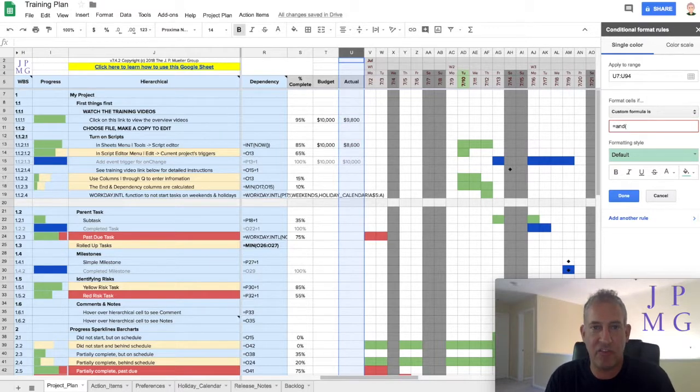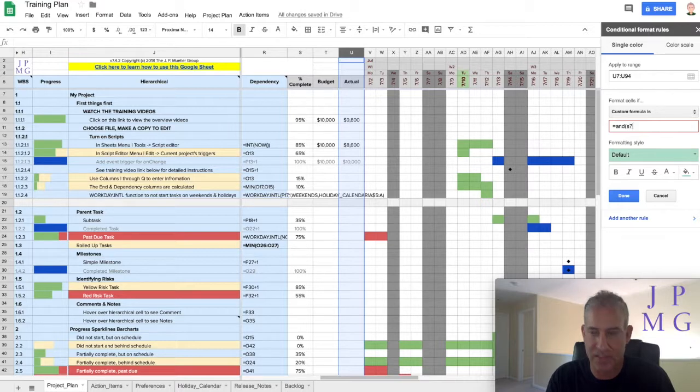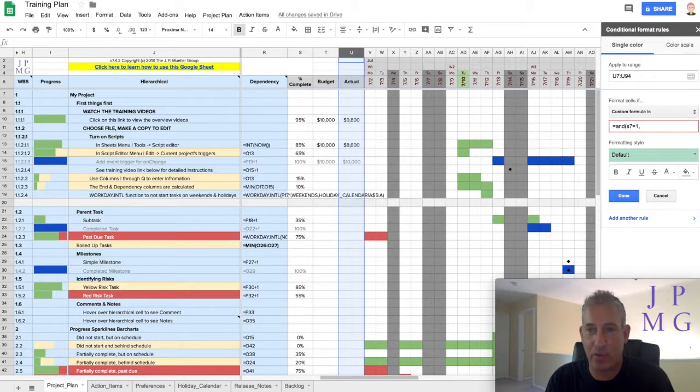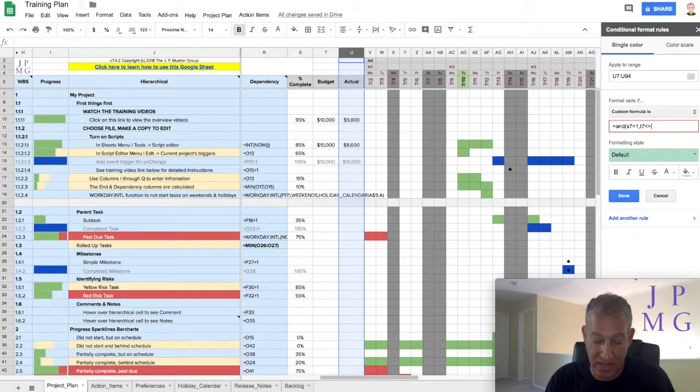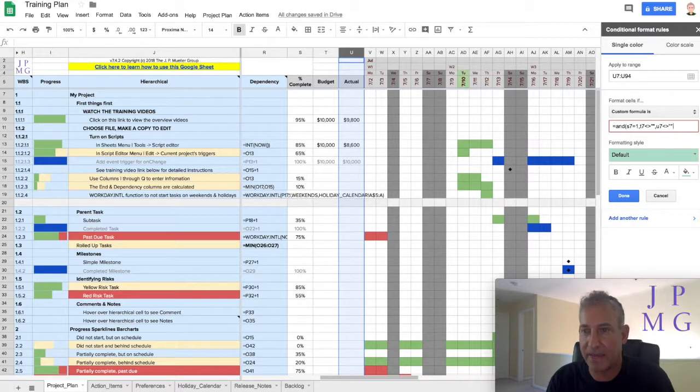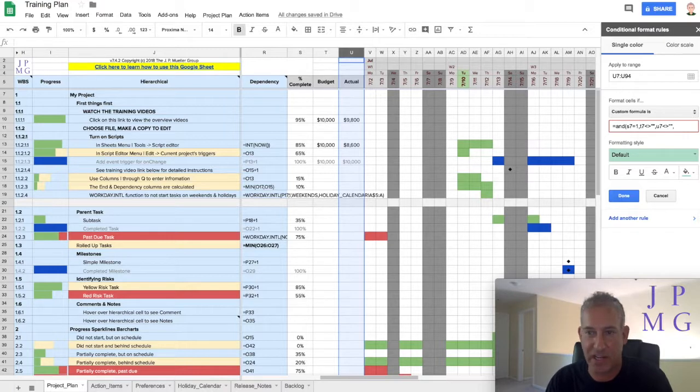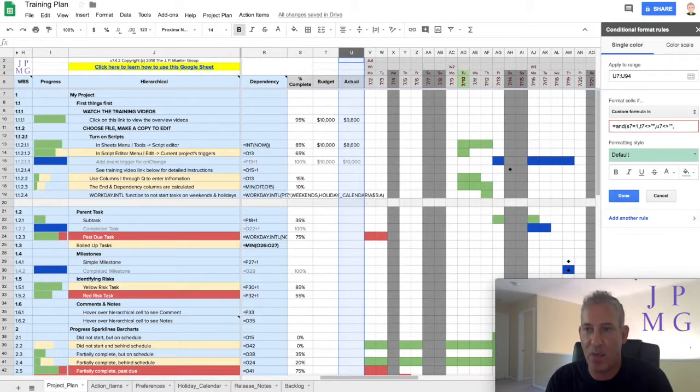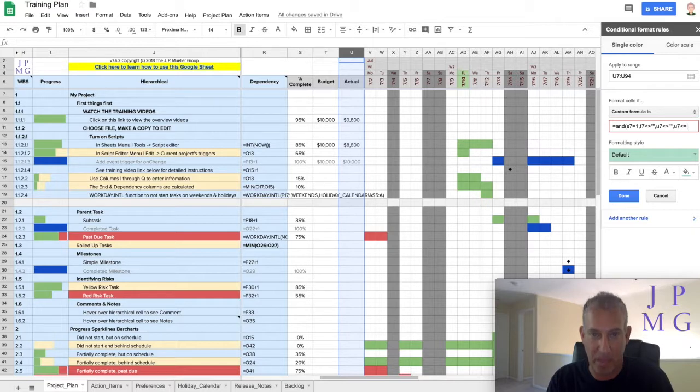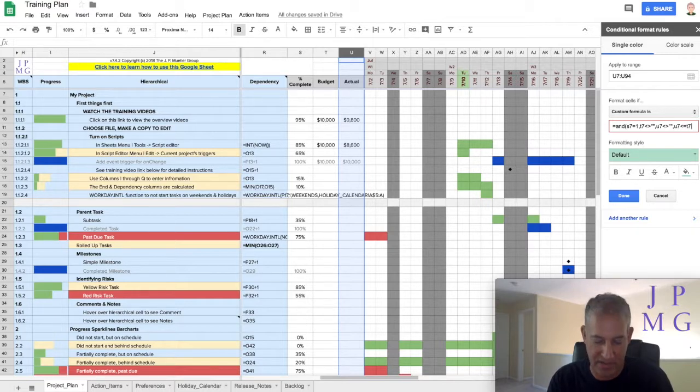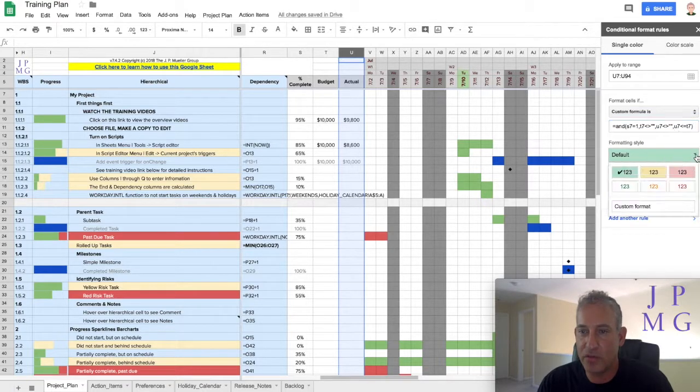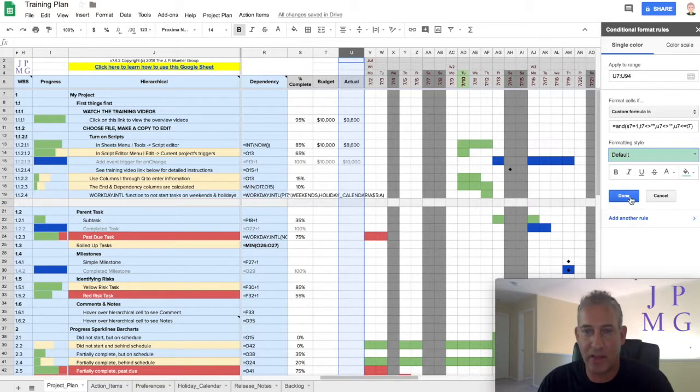So I'm going to say, if the percent complete column, or S7, equals 1, I also want to make sure budget and actual have a value. So, and T7 is not equal to blank, and U7 is not equal to blank. So basically, as long as I have a budget, as long as I have an actual, and percent complete is equal to 100%, or 1, then I want to test if U7 is less than or equal, the actual is less than or equal to the budget, or T7, close parentheses.